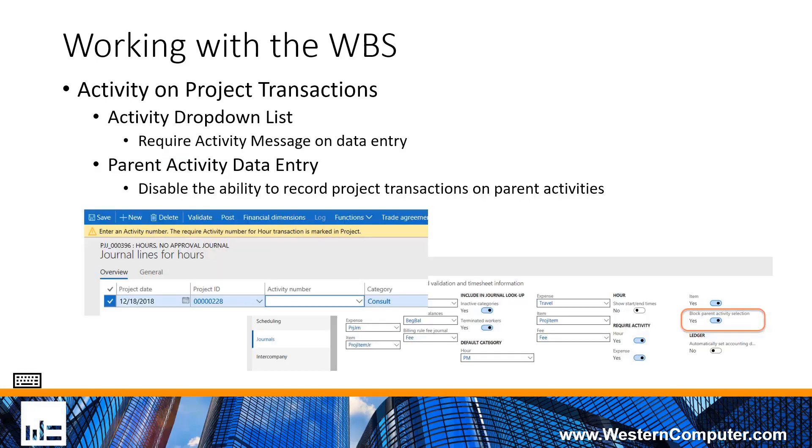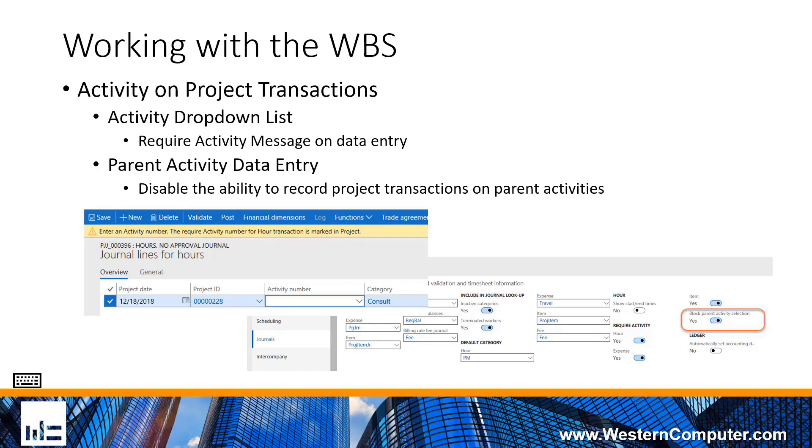With regards to the recording of these project transactions, there is some feedback that you can get within the system to let the user know the rules that you're trying to set. If you turn on the parameters to require the activity number on project transactions and somebody attempts to record a transaction without putting in that activity number, they're going to receive a message that says the activity number is required for hours transactions in the system.